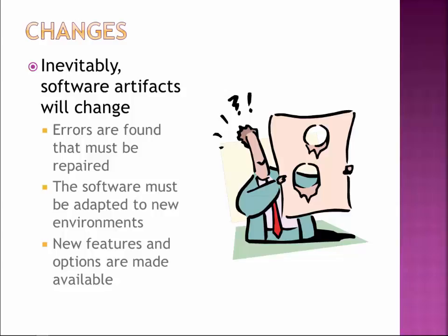Because hey, it changed. We had this project plan and somebody changed something and my gosh, we might be later than we originally planned. Well, if I said to you, you're off there building something that's going to make $100 a day for you, and you're going to release that in a month, and then you'll start making $100 a day. And I said to you, well, wait, if you make this change over here, it's going to get you $1,000 a day, but it means you're going to have to release it a week later. Well, of course, you had no trouble.